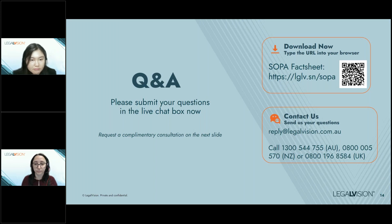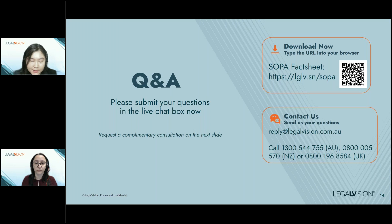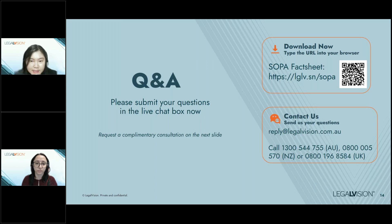Question: Can you appeal an adjudicator's decision? Yes — it can be appealed to the Supreme Court, but you must request permission from the court; it's not automatic, and the parties don't simply agree for it to be appealed. The Supreme Court will only determine whether the adjudicator has made an error of law. It's quite a tricky process, so you should definitely get legal advice before starting this process.